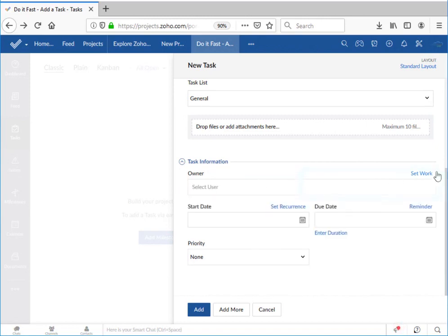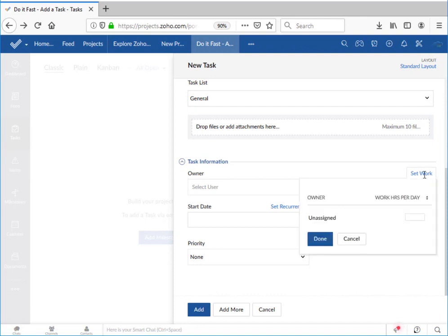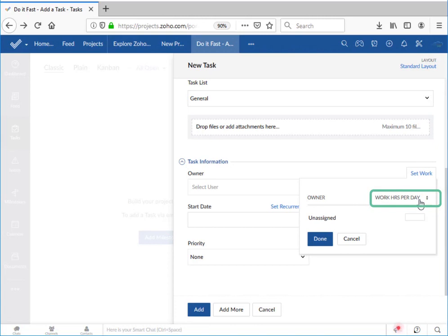The set work button over here on the right is discreetly tucked away, but that belies its power. When I click on set work I can specify the work of this task in three different ways. First, I can specify the number of hours per day that this task should be worked on. When I specify the start date and the end date in a few moments, Zoho will calculate the total number of hours for the task.